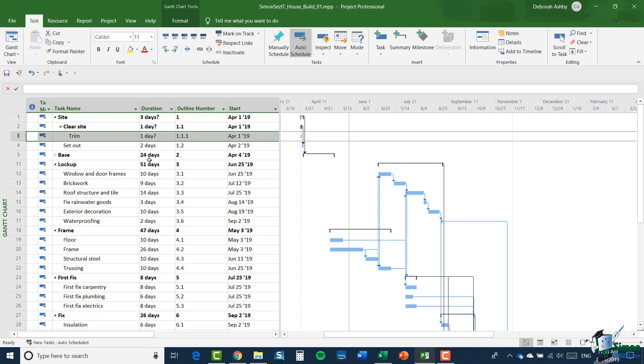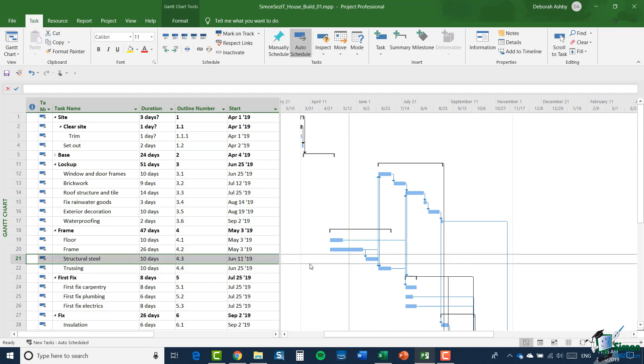But you might be thinking, well what is the point of these outline numbers? Well, they're used to be able to uniquely identify a task within a schedule. And the kind of purpose you may put that to is, for example, if you want to relate materials to a particular task. So if you were ordering some steel to use for the structural steel frame here, task ID 21, which has an outline number of 4.3, when you ordered the steel in order to make sure that people knew which particular project and task the steel was for, then you might provide the name of the project and the outline number of the specific task that the steel was to be used for.